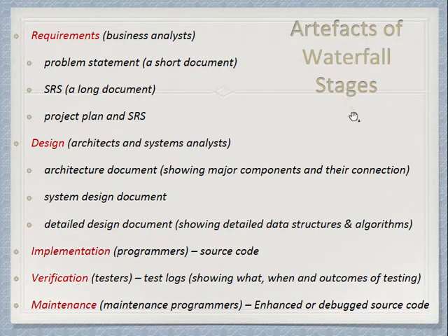So in waterfall stages, all the activities have the characteristic that after you finish one, after requirements, then you go on to the next stage. You generally don't go back to the requirement stage, and so on. After finishing design, you do the coding, and in the middle of the coding, you seldom go back to revisit the design. And they create lots of work products. They create many documents.